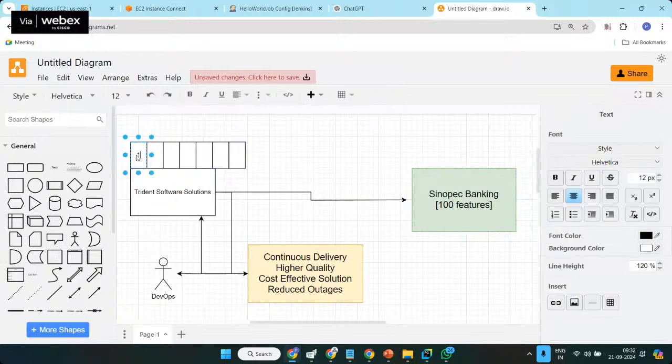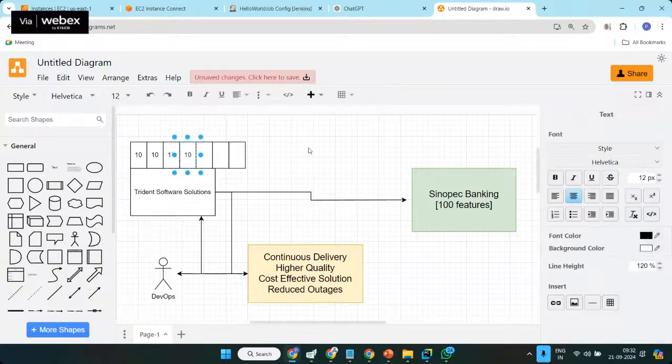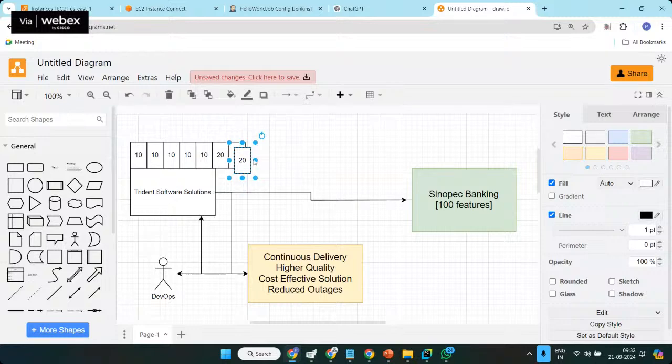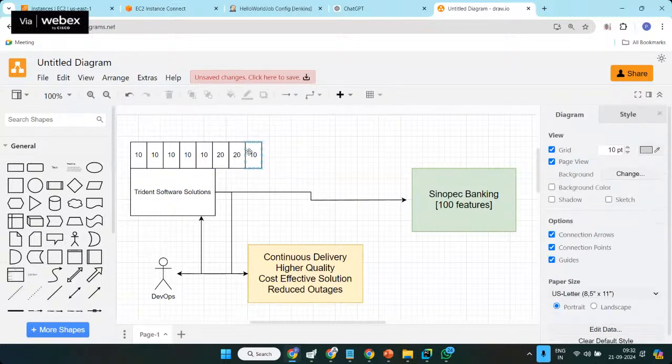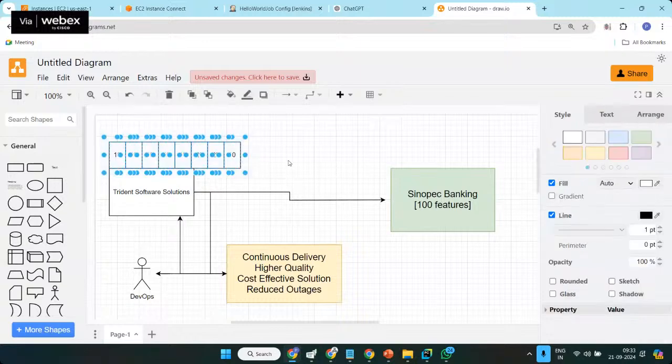Now let's say the client wants some 10 features on priority. Later he wants 10 more features which are not so prioritized. So from highest priorities to the least priorities, we break the application software of the client, and we develop the software in incremental fashion. Let's say the very least prioritized set of features, 10 features, the client wants at the end, not immediately. Now we break the software of the client into these multiple segments, and we start with the priorities of the client.